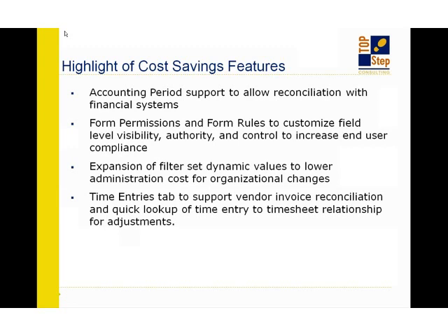It's also very good. It's intended for vendor invoice reconciliation, but just the fact that you can do quick lookups on it from a project, a client, a user, a date perspective, the time entries tab in the timesheets module is a really helpful tool that has you avoid the extra steps of running a report.